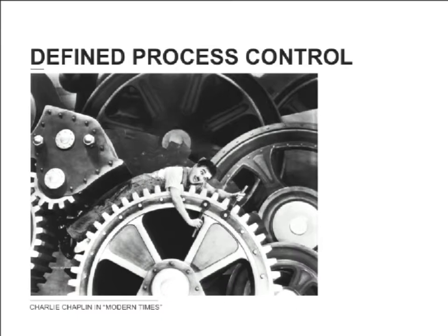What does that mean? So if we have a project and we want to build something, we think, okay, we want to build this, so we need to define this process, we'll have these steps. The individual steps might take a longer or shorter amount of time, but then we estimate all the individual slots, the individual activities, and then you have the overall big master plan, which says how long it's going to take to build this thing.